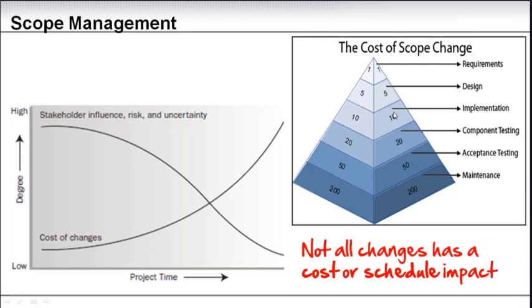scope. So it might be that you are just changing a few small parameters, or you're changing something that it doesn't matter if you do it A or B. But in order to document it, and the whole process of getting the scope change documented, assess the impact, and approve it, in itself is an indirect cost that increases. There's an arrow that goes down, but the cost, you can see, is highest in the bottom.